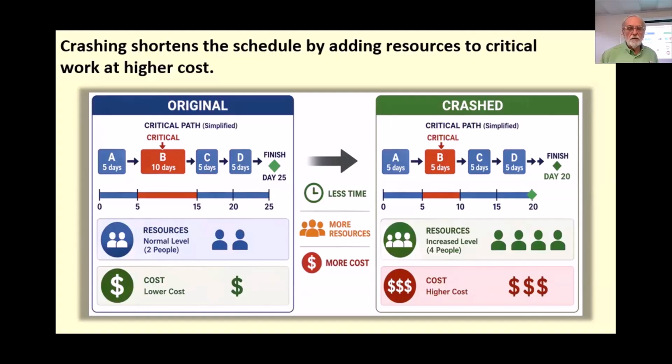But crashing can be effective, but it's not free. It often raises cost. It can increase coordination complexity of the project, and it also can create risk. It can introduce additional risk as we get more people involved, as complexity increases. And it may not work well for tasks that don't parallelize easily.